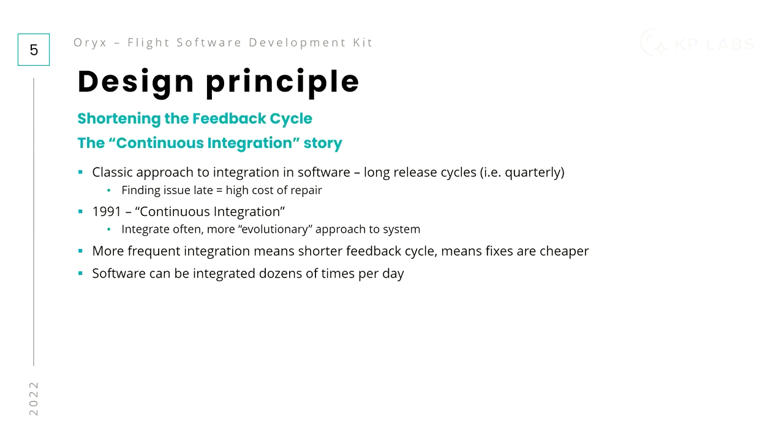And what people have found is that the longer you delay the integration, the more probable it is that you find some issue, some problem after the integration that will be so severe that it will require going back and redoing part of the work, which incurs a huge cost for the project.